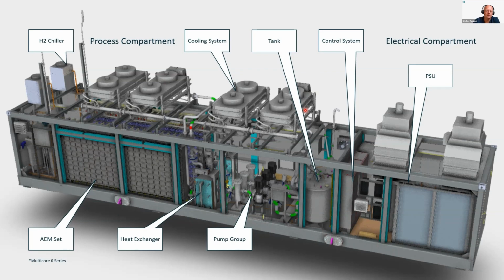Okay. Going back to the water quality, which was defined as 5 microsiemens per centimeter. The question is if that pre-water treatment should be done on the customer side. Yes, this is part of the integrator scope. The water purification system is not in our container. This is a frequently asked question, but this is part of our partners' scope. So it's not part of the container. Okay, thanks for that.